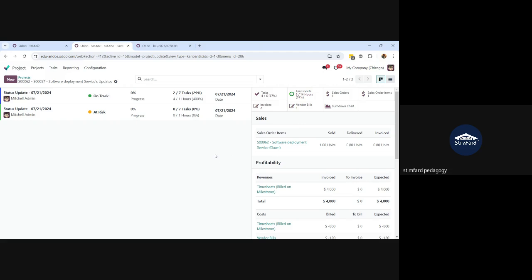But for this project, a relevant example can be what we do in our regular routines. For some customer requirements, when we do deployments, for some customizations, we search the Odoo app store, and we find the relevant app. If it is suitable, we purchase that app rather than doing the customization. We purchase that app, plug it into the customer DB and give them the solution for their requirement. For the time being, I'm just going to have a purchase order for the app purchase, and then we have the bill, and we will see how that cost is reflected on our project.